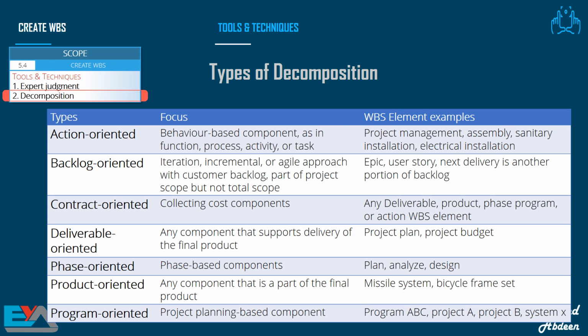That means breaking down the project into epics, then iterations or sprints. The next level is backlogs, then features, then user stories. I will show you an example later. Based on the project size, type, and complexity, you can select the type of WBS decomposition you will use, or you can tailor and combine between these types.